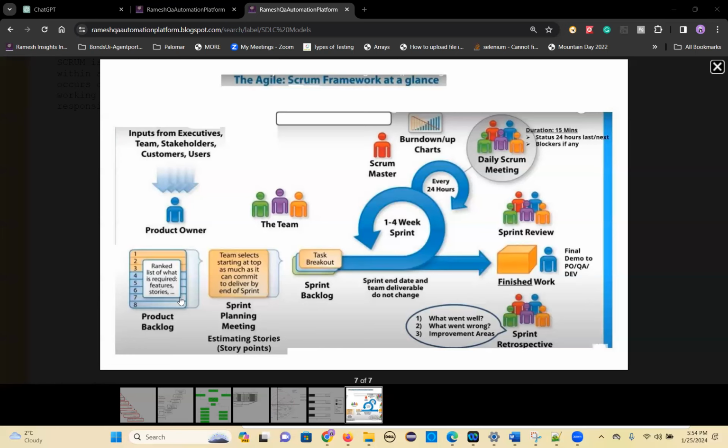That means which developer. For example, login, I want to give to Janani. Registration, I want to give to Rajeshwari. Online payment, I want to give to Bhargavi. Add to cart, I want to give to Venkatesh. Like that, each user story will be assigned to one team member. Is this clear? That's what is decided in the sprint planning meeting.